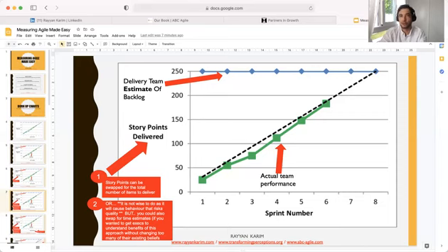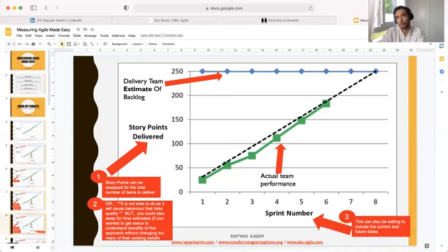And then you can evolve the chart and the practices afterwards. So if you need to go with time just to get it in there, that's fine by me. And if that becomes useful for the teams and they don't want to change, that should be okay too. Down the bottom, you've got number of sprints. Now, obviously, you can just edit that and you could just have a timeline. You could have dates there that show, therefore, you'd know over time. You could also obviously include both. You could have the sprints and the dates there.